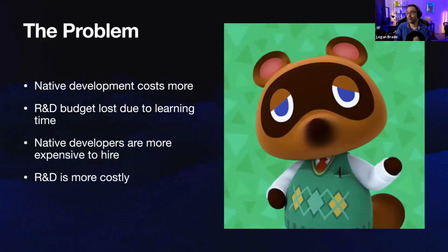The problem is that native development just costs more, right? If your developers are creating a login screen, they have to do it twice, and often at a higher rate than web developers. We lost pretty much our entire R&D budget just due to ramp up time. We had 4 developers who essentially had to learn those skills to develop native applications. That took about 4 weeks just to get through some courses and be competent enough to say, yeah, I can do this.